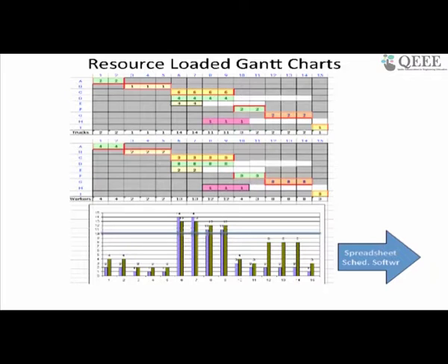So there are a lot of subjective elements which come in when we talk about a multi-resource single project itself, which means when we go to multi-project, multi-resource, you have to give priority. Which project is more important for me, where can I delay? There might be 2 projects competing for a resource, and for one project, even if I delay by a bit, it is acceptable, while the other project is extremely critical. So I have to have these elements also modeled in my software, so that when I resolve over-allocation or do resource leveling, these kinds of aspects are also considered.